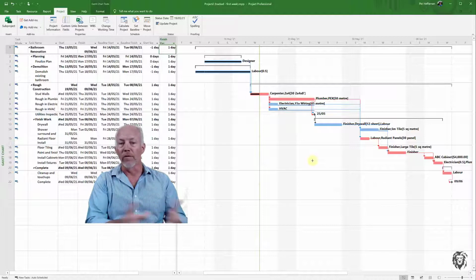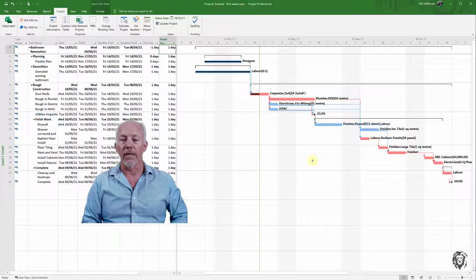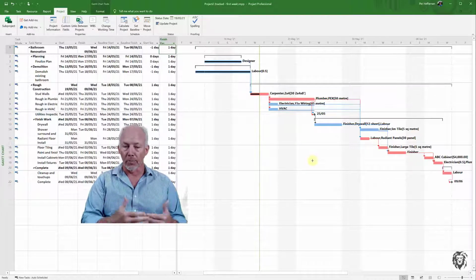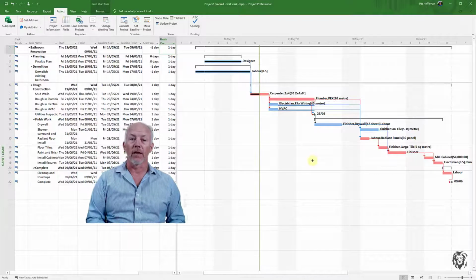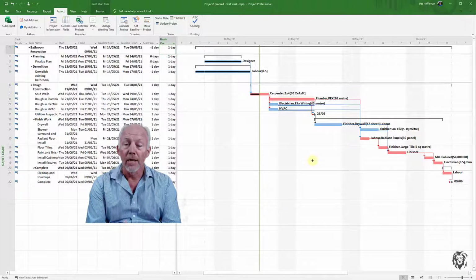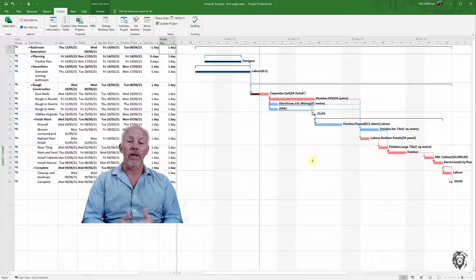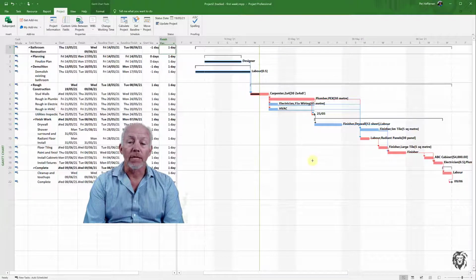We're going to have to remove all the shelves that are in there, strip out the flooring, remove some of the damaged drywall when we do all of that, and then put in the door, the electrical, the flooring, and some kind of a closet organizer. And that would then give the client this walk-in closet that they think they want. And of course, what they need to know before they approve it is how expensive it's going to be and what's going to cost them in time. So that's what we're going to try to do today, is provide that information to the client so that they can make a decision.